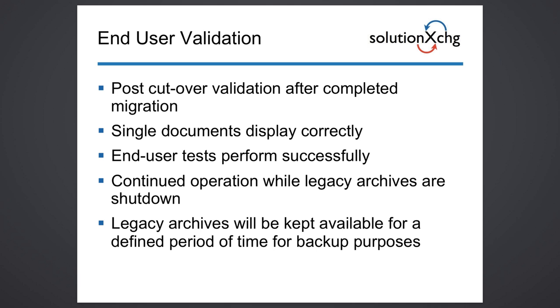Once the migration was done, we had end users do an end user validation. Specifically, a post-cutover validation of the completed migration. We made sure that single documents displayed correctly. The end users performed specific tests in their business scenarios, bringing up documents from a workflow, bringing up documents from their regular transactional screens.